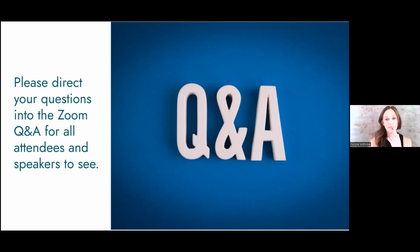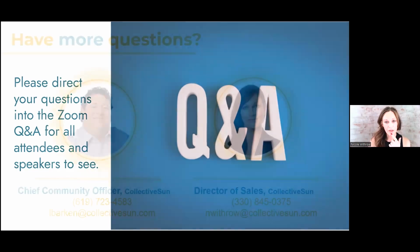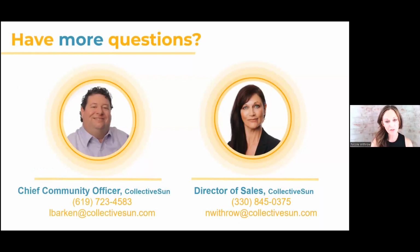Excellent. I'm going to do, I think, 1 or 2 more. Do I understand correctly that you should apply for this after contract, but we don't have to wait for completion? Correct. Do not wait until the project is completed, and be aware that if you put the project in completion before you get an award announcement, you're going to become ineligible. So don't do that either.